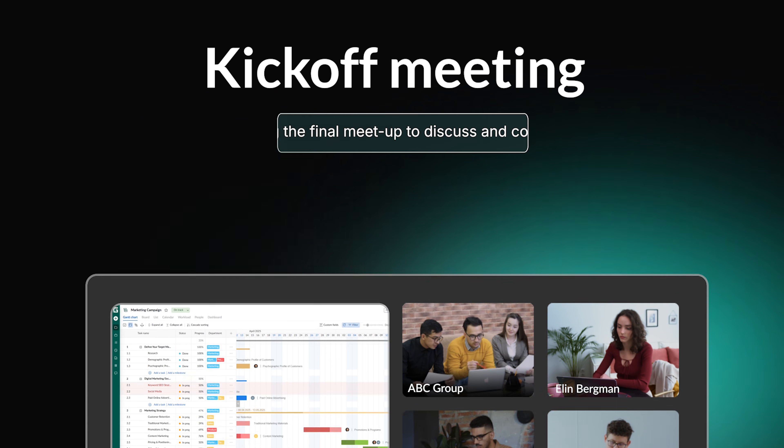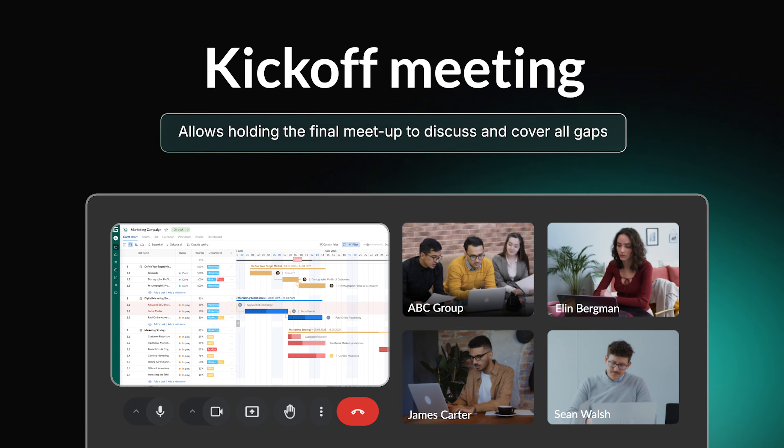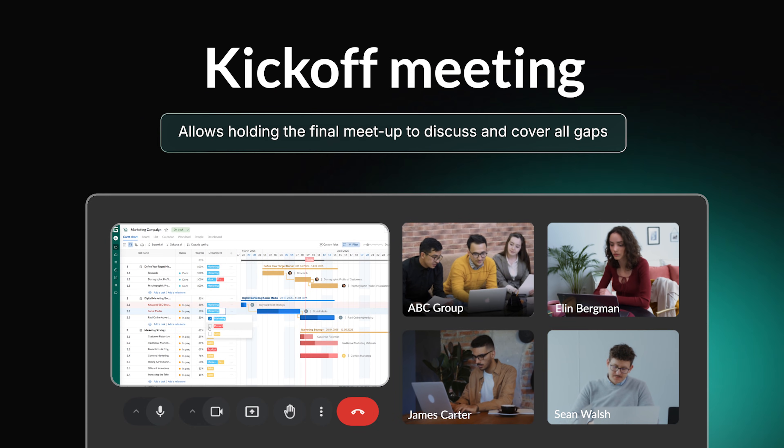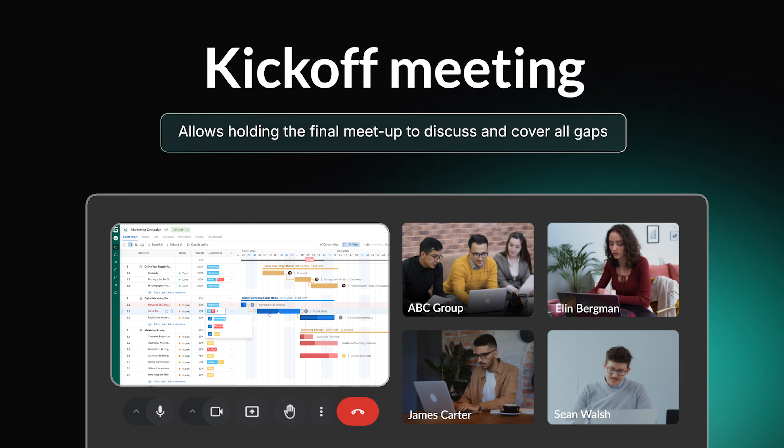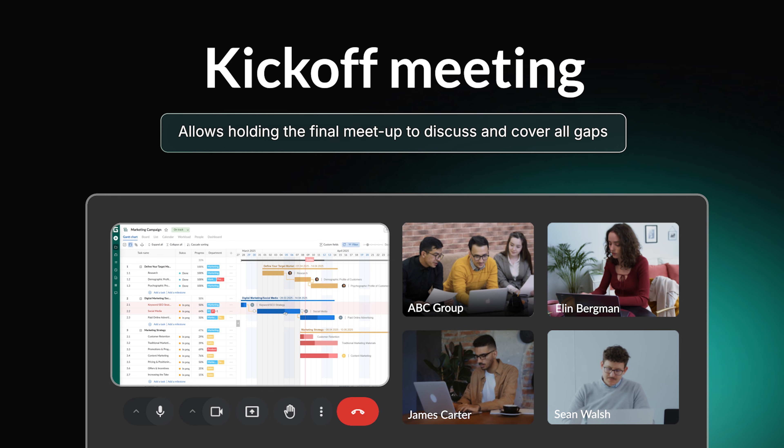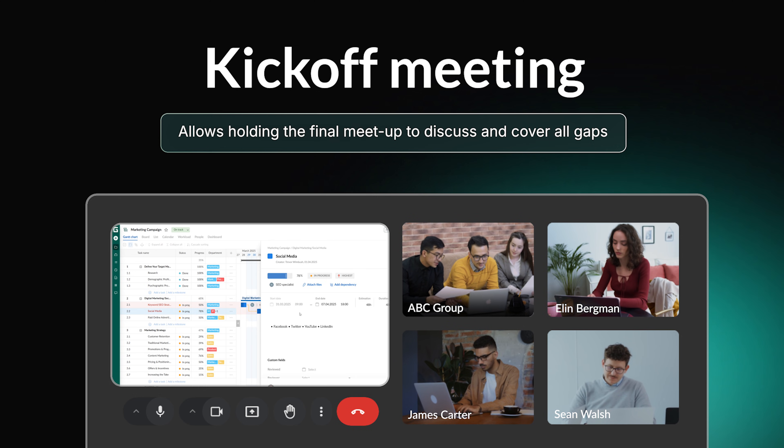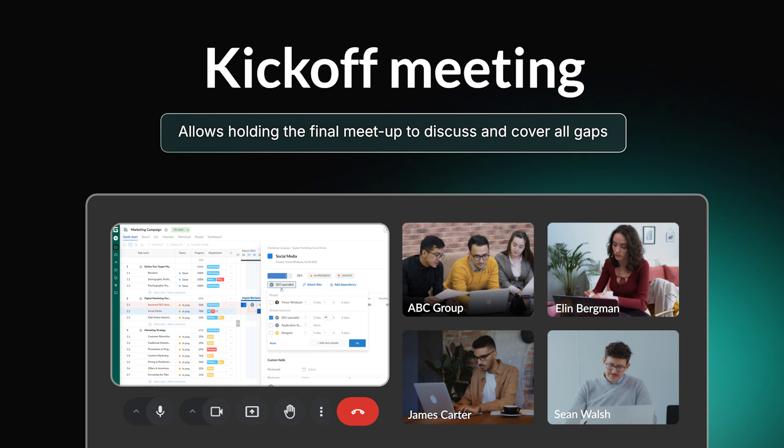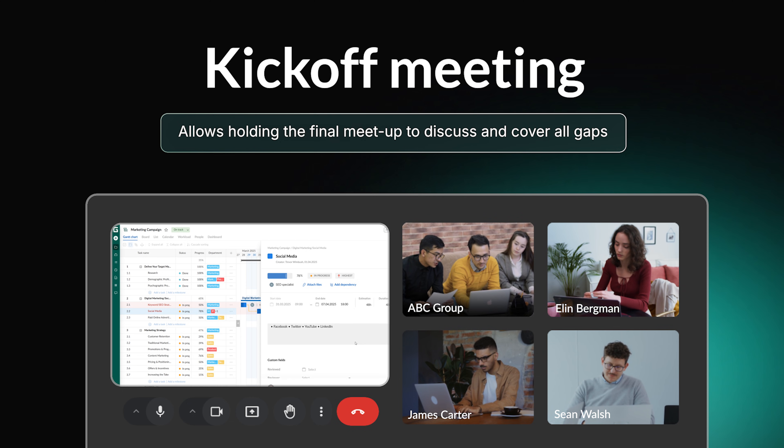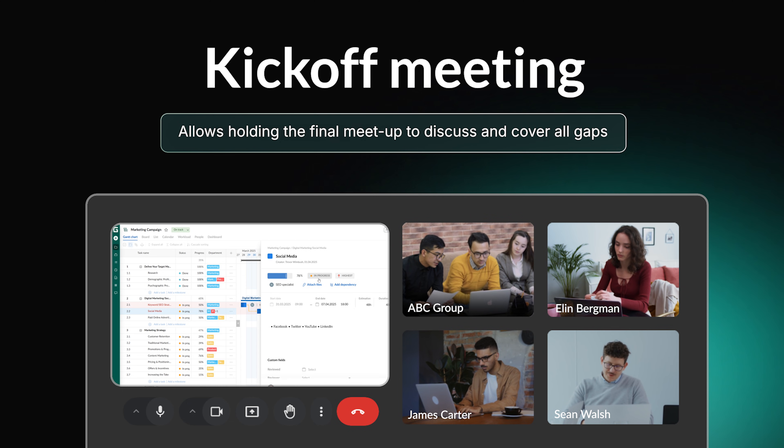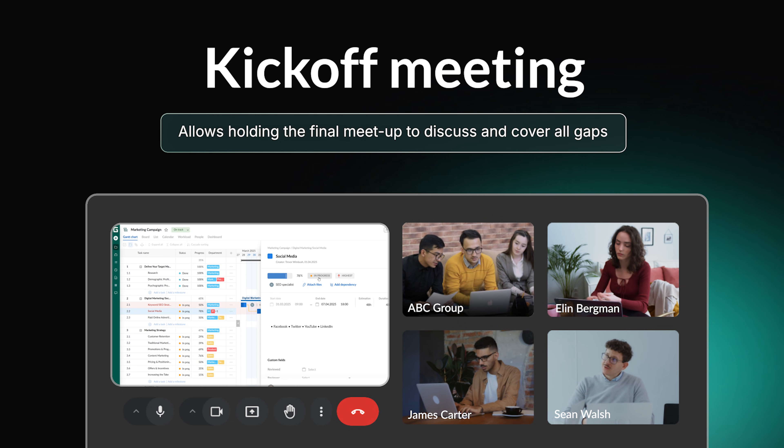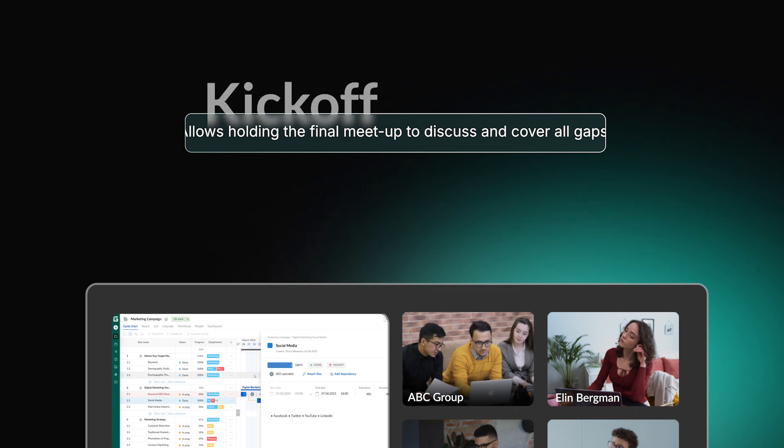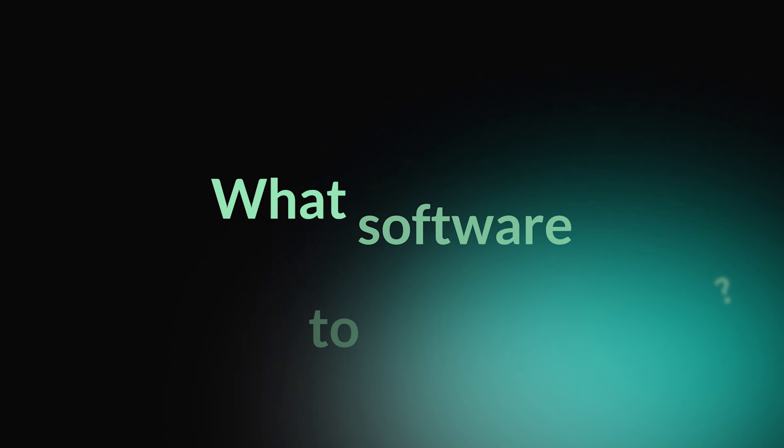The process of creating a roadmap for a project requires arranging meetings. It is necessary to introduce the work team to stakeholders and other project participants. The kickoff event also allows holding the final meetup to discuss and cover all gaps before the project starts.